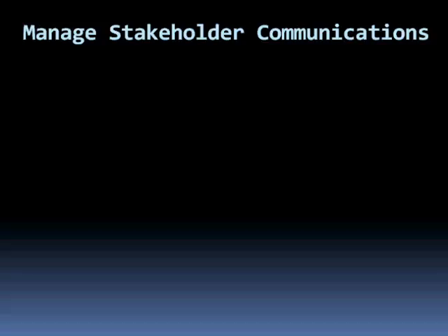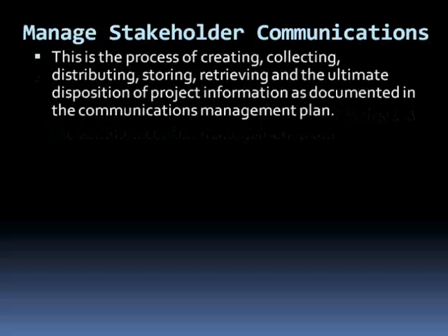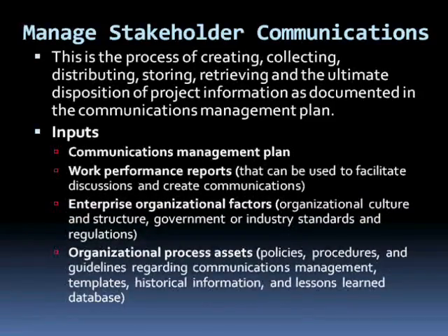Once we have plans in place for communication and stakeholder management, during the course of the project, the duty of the project manager will be to manage stakeholder communications. This is the process of creating, collecting, distributing, storing, retrieving, and the ultimate disposition of project information as documented in the communications management plan. The inputs to this step will include our communications management plan, which will serve as a guide to undertake this step, work performance reports, and these can be used to facilitate discussions and create communications.